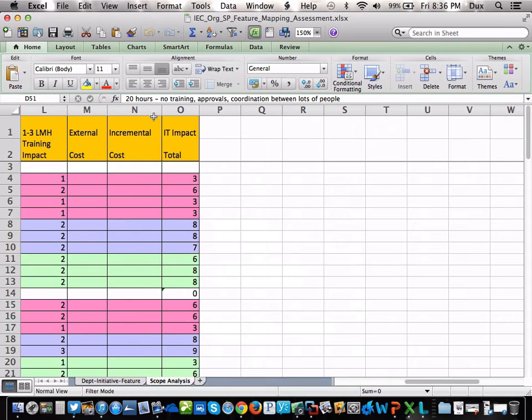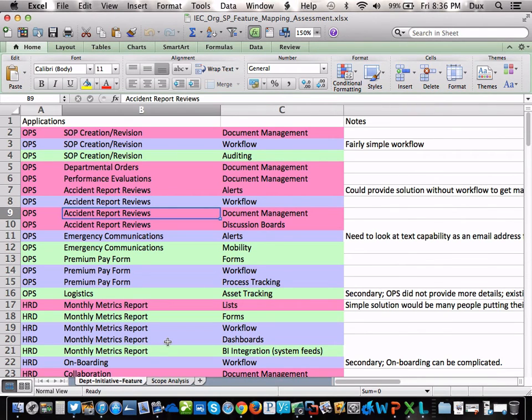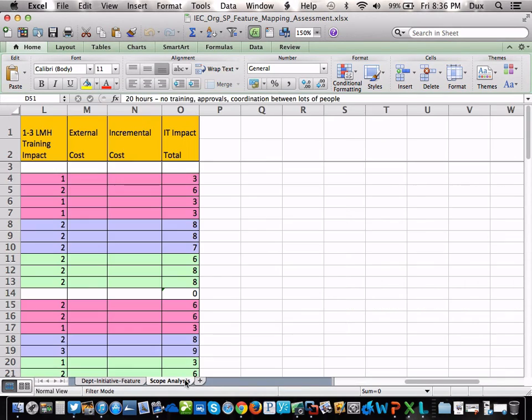Once you have hours and estimates, if we hire external costs, it's going to cost. What about incremental costs? But you need this because the check writers or the business would understand this. This is what it's going to take. So we could go back to the initiative tab, and for the first one, it listed 3 out-of-box features, right? So you would add up whatever the cost numbers are on the scope figure to get a level of effort for that.